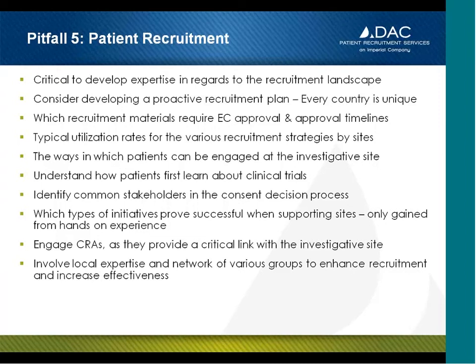Also, a forecast of each site's expected screening and enrollment should appear with weekly forecasts for those studies that have a very short duration, or a monthly and yearly forecast for those studies that are longer term, throughout the duration of the trial. Mapping a site's actual enrollment performance over time against the predicted allows for real-time adjustments to be made on both the sponsor's and the site's behalf to get the study back on track. The constant exchange of information prevents that elephant in the room syndrome, if you will, when enrollment is not tracking as expected.